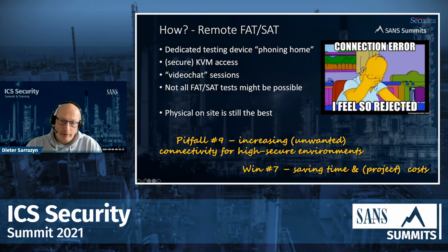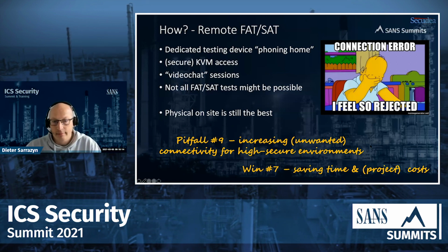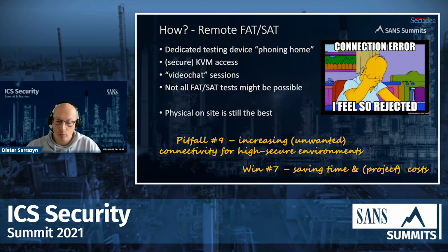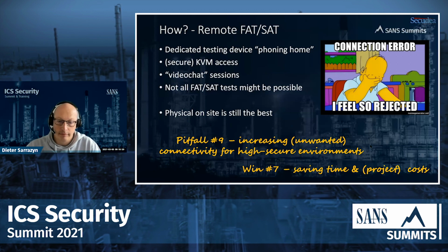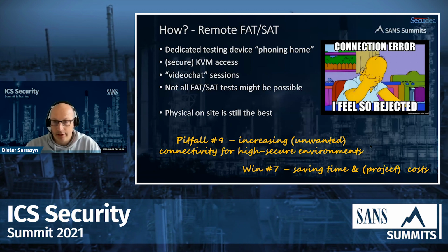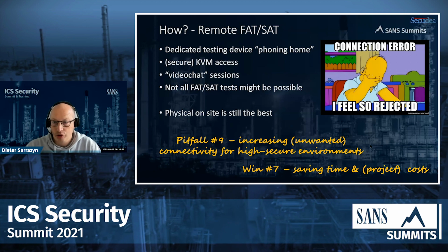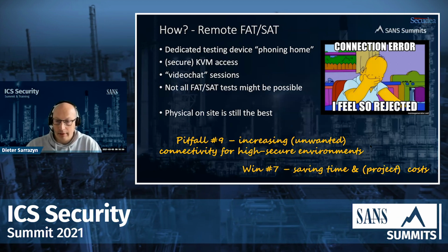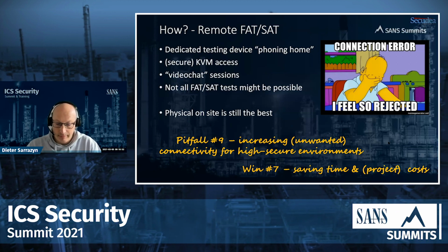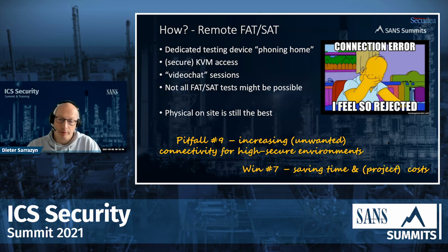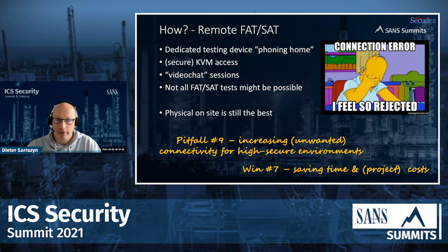And there's a big pitfall here, which is that you increase unwanted connectivity for high secure environments. Depending on what environment you need to test or verify, you increase having another connection into that environment that should not be existing. And of course, a big win is saving on time and project costs. So it's a debate between security and economic reasons and feasibility of what you can do.